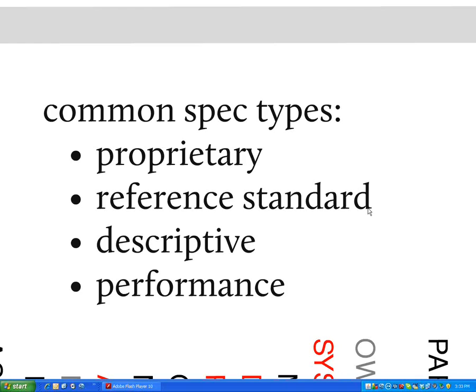You may just list that as being a fabricator that meets certain PCI level certifications, rather than naming specific names of precasters. On the other hand, if it's curtain wall, you may want to limit it to the firms, the aluminum pushing firms that you have a certain amount of experience with and confidence in.